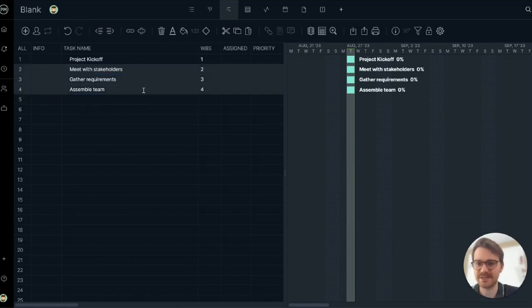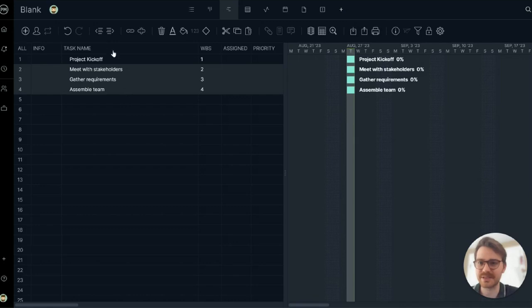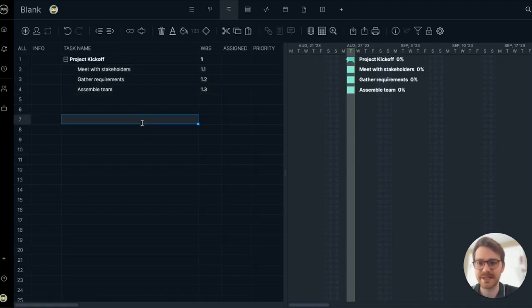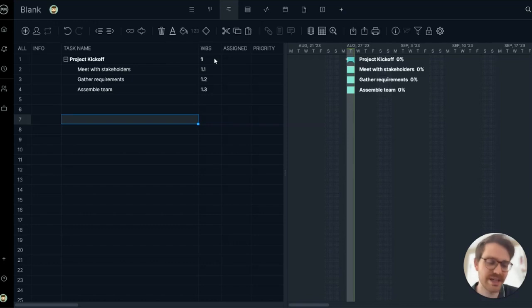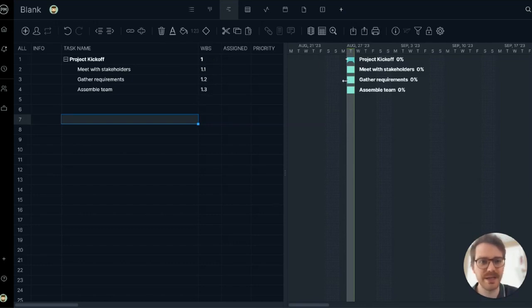Let's make these tasks subtasks. I'm going to highlight these three rows as if I was in Excel and indent them. Now it's a phase, as indicated by the work breakdown structure column. 1, 1.1, 1.2, 1.3. Fantastic.